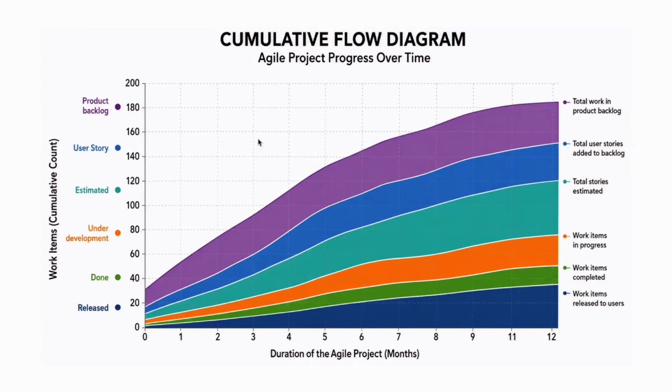So at least for the current sprint and the upcoming couple of sprints, we should have a clean product backlog, which is elaborated, estimated, user stories are available, acceptance criteria is defined, maybe reviewed and ready to release kind of.